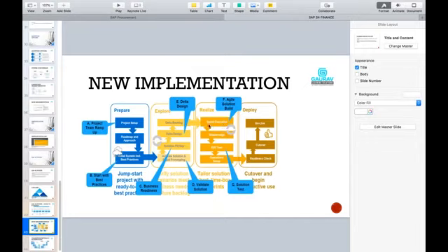Okay, so you can see you perform your configurations in sprints. So only 7 or 15 days of configuration will be impacted if there is something wrong. So you do the walkthrough and then you go to the next step, that is, you perform your unit test, integration test, whatever test you want to perform here, and finally you ask your customer to perform the UAT. You make sure that everything is ready, prepare for the cutover, and just go live.